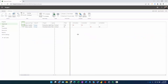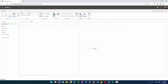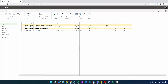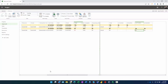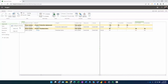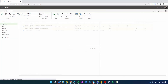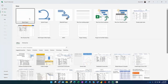Since I'm the project manager, I go to Approvals - I would normally receive an email notification if I configured notifications. The task names and projects they belong to are listed. As a PM receiving many updates, you could group by project. Expanding all levels shows the detail: one task had 16 hours with 8 entered on the 17th; I submitted 8 hours. I'll select both, click Accept, there's an opportunity to add a comment, and now there are no more approvals waiting.